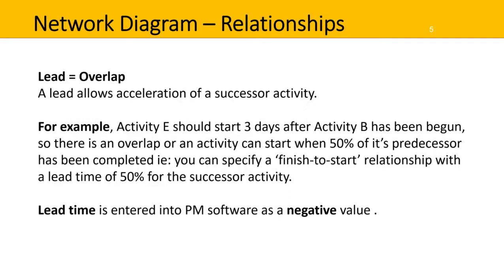Lead means having an overlap and allows acceleration of a successor activity, meaning you can start the activity sooner. For example, activity E should start three days after activity B has begun, so there's an overlap. Or an activity can start when 50% of its predecessor has been completed. That is, you can specify a finish-to-start relationship with a lead time of 50% for the successor activity. Lead time is entered into project management software as a negative value.